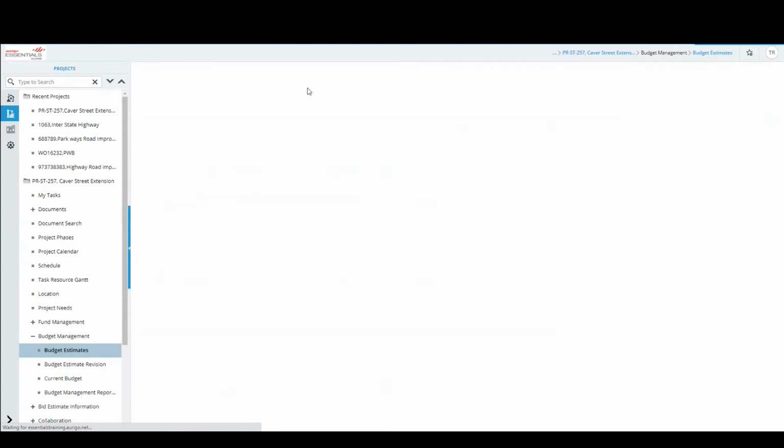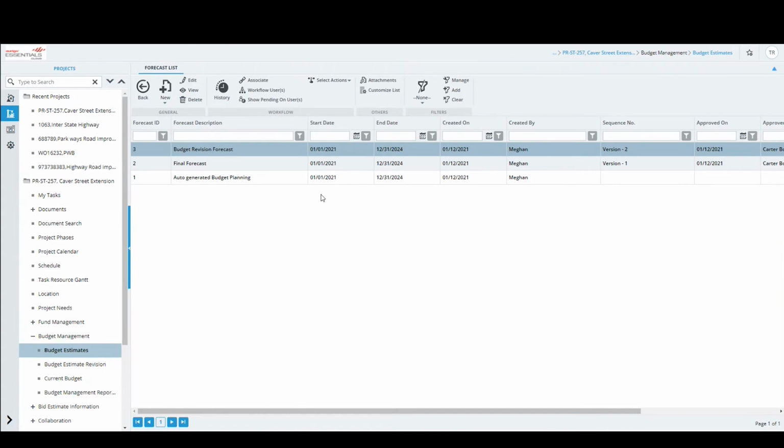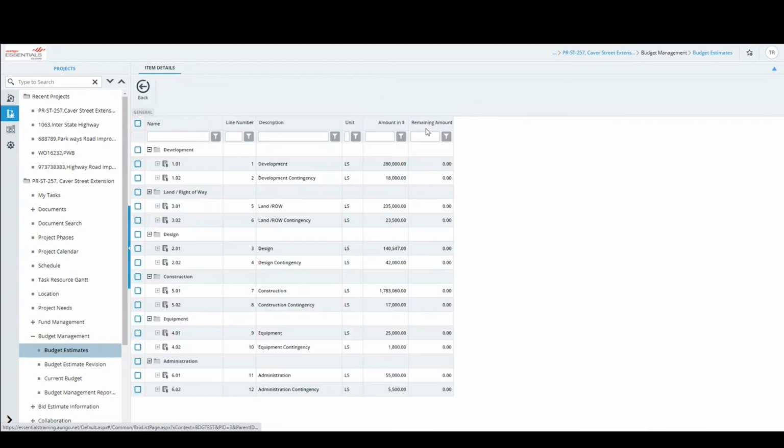So if I want to view that forecast spread, when we looked at this forecast spread, do you know where exactly would we see the spread of it? We have a budget estimate which we would be creating a forecast as well for. We have the spread of each item, start time and end time. If it is going for one whole year, every month, how much it is spread out in a linear fashion, it will be spread out.